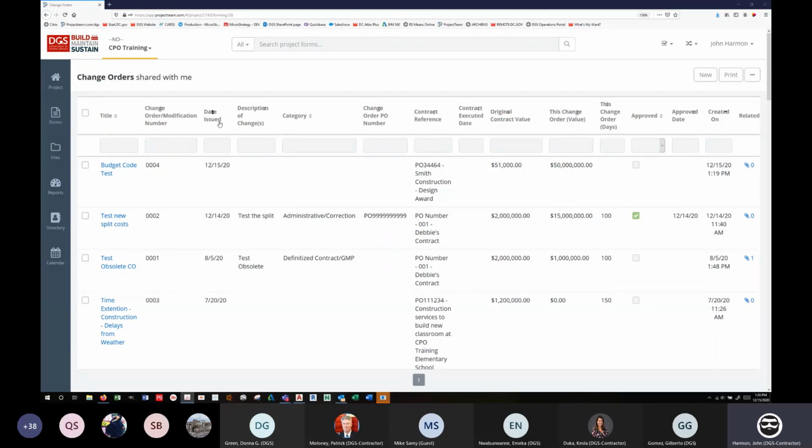You have to go in and review and approve everything and then tell them when it's all agreed, just like the normal pencil copy process. Yep, we all agree on this. Go upload your actual invoice. Because it's an official vendor submission, just like that PCO, you as the PM cannot make changes to what the vendor is submitting. If there are changes that need to be made, the vendor needs to do them.